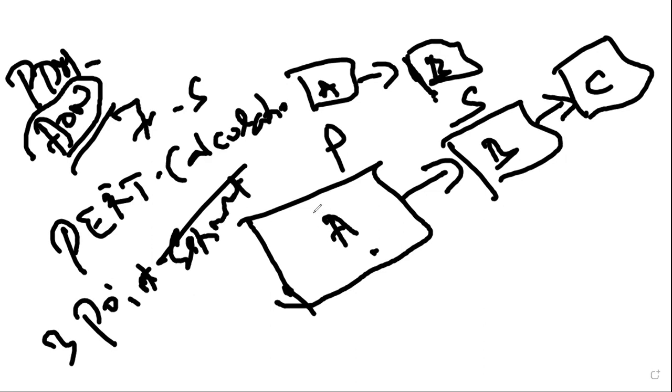If I'm asking you how long it will take to complete activity A, I need you to come up with 3 numbers. One number can be the most likely number. The other number can be a pessimistic approach. The other one can be optimistic. Best case, worst case, and most realistic case. So you're able to give me an average. Okay, it will take 5 days. It will take 6 days using 3-point.